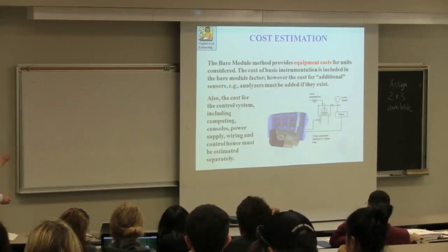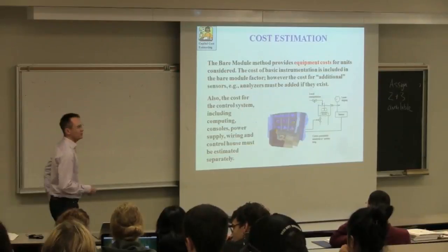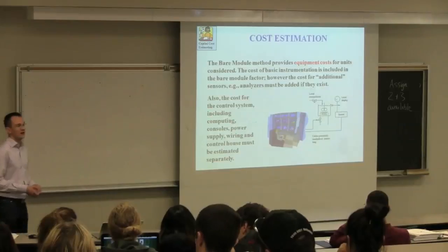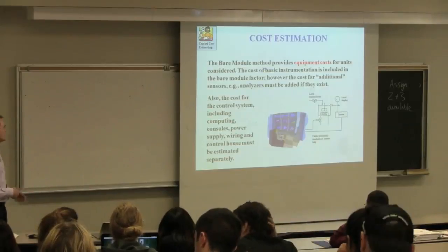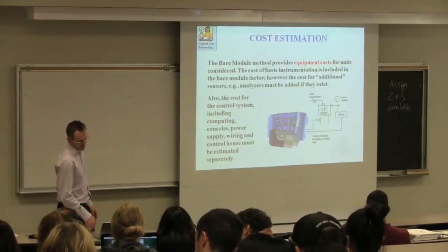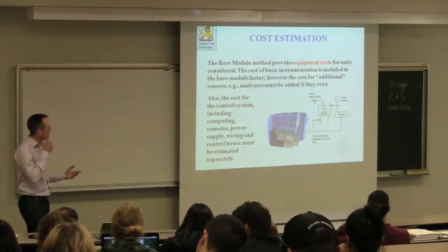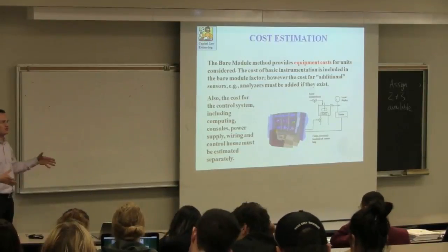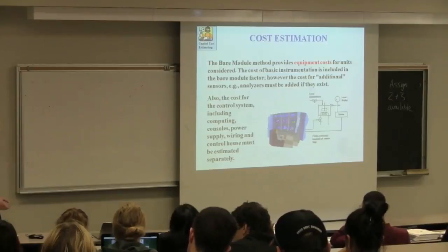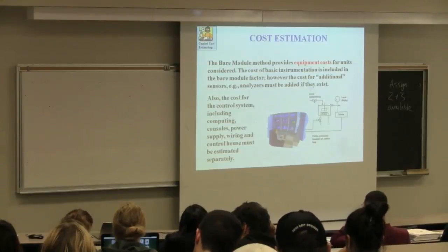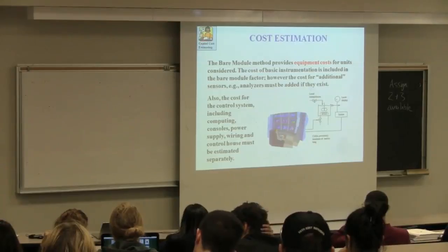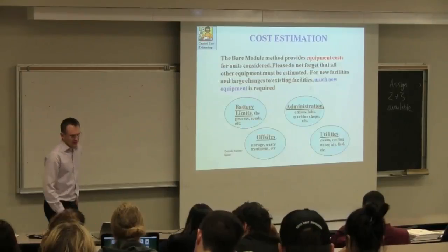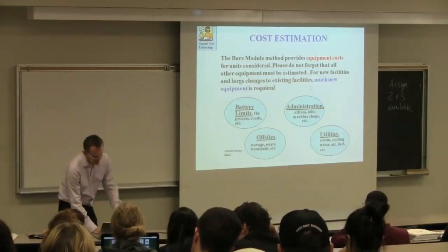There's also some additional factors here. There's the control room, computing power that you need, especially for new plants that are being built. There's a significant cost of the analytical equipment, that laboratory equipment, all the wiring that goes between them. In many new, at least when I was working in a former company, where we would expand, there is always at least a 1 meter chase left just for wiring and piping. So all the network cabling to be pulled through that, and the piping that goes with that is substantial cost to be added in.